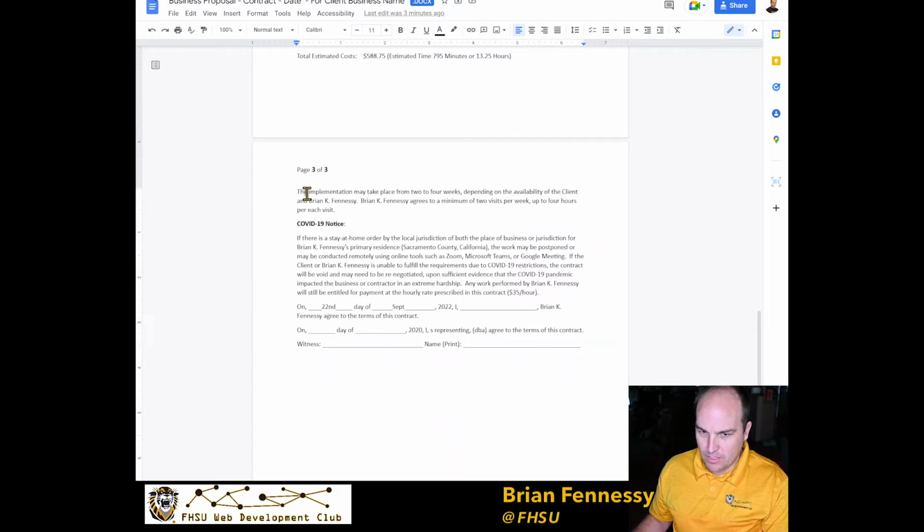I give them a little bit of expectation on how long it's going to take me. So 2 to 4 weeks, depending on my availability. And I do set a commitment with them because they may want to see my face a certain number of times each week, via remote or in person. So I say, hey, look, I can commit to come into your office at least 2 times per week for up to 4 hours.